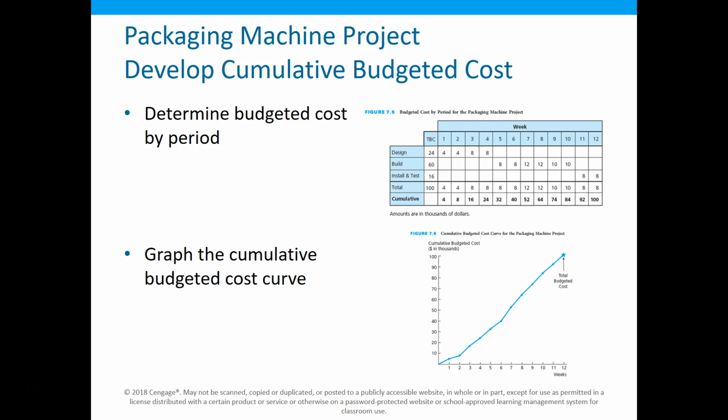So things like Excel, great. Project management software can also do these kinds of things. This gives us a way we can see where we're going to spend money. I need to go to the accountants in week 6 and say, oh, this week we're going to spend $8,000. Next week we're going to spend $12,000. So that they know when we need cash draws, so that the cash is there or whatever we need. Because we budgeted this way, that means it's going to work this way, right?